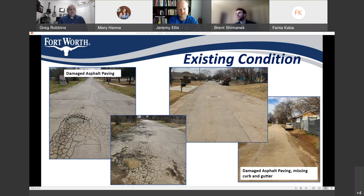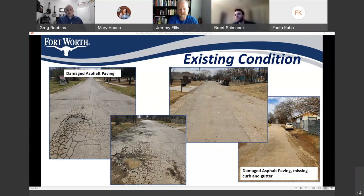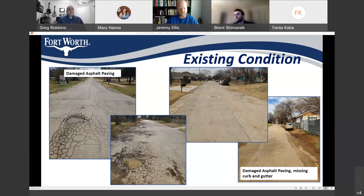This slide shows the existing conditions of these streets and why they were slated for reconstruction. You can see from the pictures the issues we will be correcting, including damaged asphalt pavement, missing or broken curbs and gutters, damaged or missing sidewalks, damaged or missing concrete driveways, as well as replacing or upgrading the water and sewer utilities under the street.